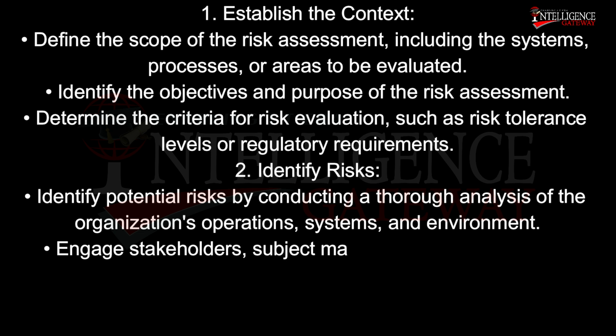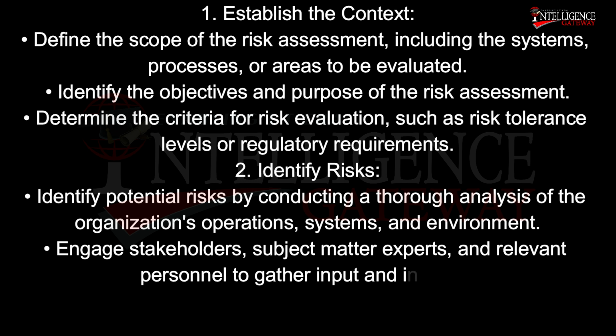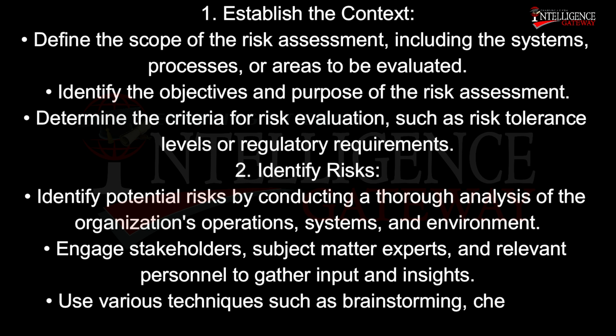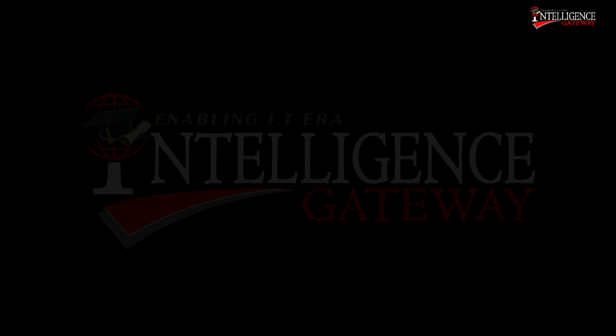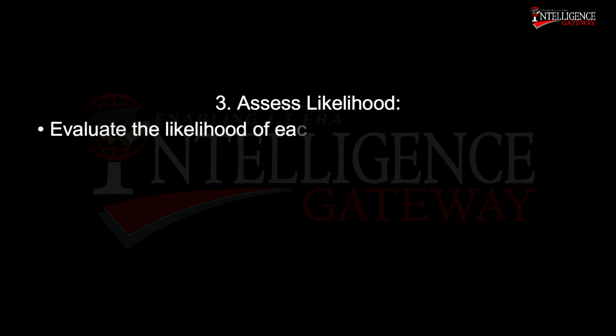Engage stakeholders, subject matter experts, and relevant personnel to gather input and insights. Use various techniques such as brainstorming, checklists, interviews, or process mapping to identify risks. 3. Assess likelihood. Evaluate the likelihood of each identified risk occurring.